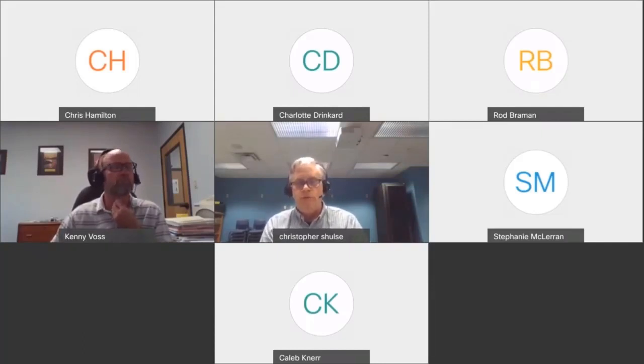I'll also mention, in addition to that, that ordinary high water, based on the Corps' definition, can sometimes be different than what may be on a set of bridge plans. Oftentimes what we are looking for, again, I refer back to that slide that shows the line where vegetation starts on the stream bank. So anything below that line is what we're interested in reporting to the Corps. So a lot of times that's lower in elevation than what is shown on bridge plans.